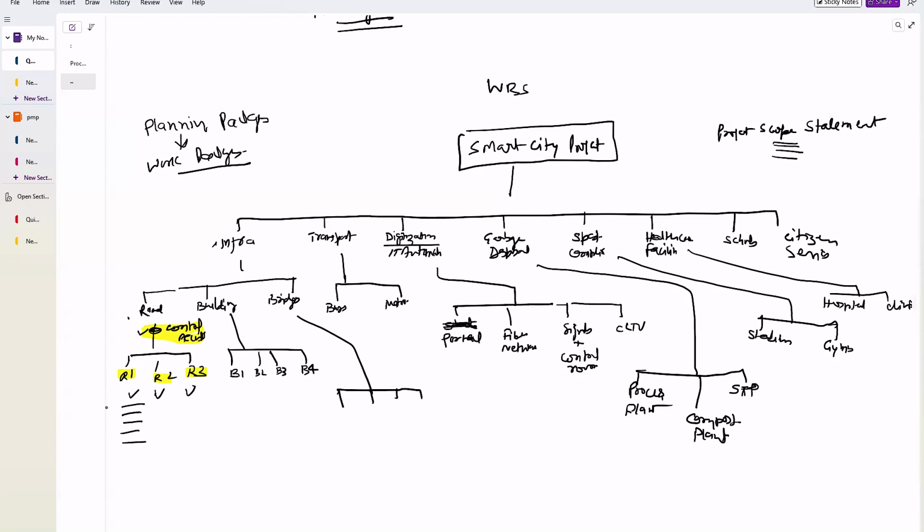Maybe you can say that these activities are not one item. You have to do, say, the ground leveling of the road first of all, using the excavators. Then you have to put stone in the next one. The civil people can talk about that road. After that, you have to do the compaction of the road, right? Maybe you need water and filling so that it gets compacted. After that, you have to fill something on that, and finally you have to do the tarring. So these are activity number 1, 2, 3, 4, 5, 6. There is a sequence, right? So these are called sequences.